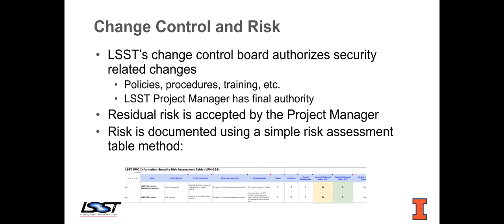The change control board, as I mentioned, really what it's doing is authorizing security-related changes. The reason it's done that way is the project manager is the person that accepts the residual risk — he's the head of the change control board. The approval is acknowledging that whatever risk comes about from the security plan, he is accepting that residual risk. We use a very simple table — a table that comes from Trusted CI's risk registry template, circa 2015.